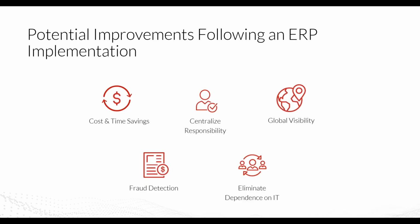Keep in mind that each banking format can cost you 3 to 4 weeks of development time and resource expense, plus an additional 6 to 8 weeks of testing time and resource expense prior to implementation with your financial institution. Also note, each system that connects with the bank incurs additional bank service fees, software costs, and in the case of on-premise solutions, significant IT resources.